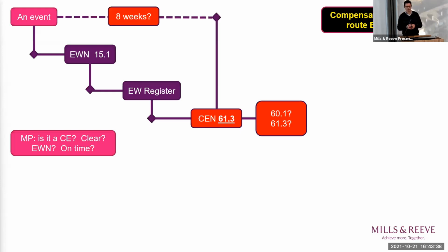There's another little trap for the contractor to be aware of, in that for a number of compensation events, not all of them, there is an eight-week cut-off period in which it has to serve its compensation event notice. So it's important to ensure that when you're managing successfully from a contractor perspective, that they bear in mind this 8-week window from when the event occurred. And there's a little bit of case law about when you start the 8-week clock ticking, but to be on the safe side, I would suggest that contractors should issue that notice as soon as they can.